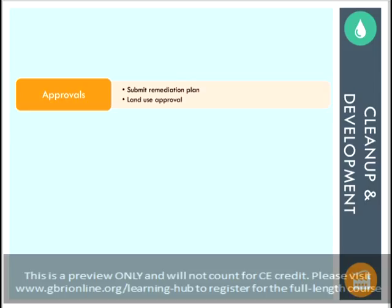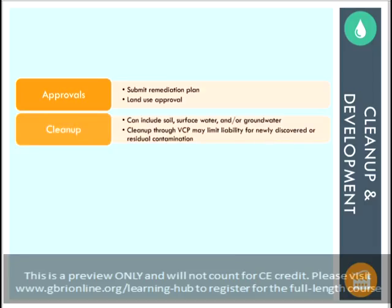Because many brownfields are in more developed areas, there may be city or local codes that need to be acknowledged, or there may be historical preservation protections in place that will need to be considered. Once all approvals have been secured, the site cleanup can begin. This can include cleaning of the soil, surface water, and ground water, and can also entail removing hazardous materials from the site. In cases where the developer performing the cleanup is not the same entity who originally created the pollution, a state voluntary cleanup program may be involved. This can often limit the developer's liabilities with regards to any contamination discovered after the cleanup process has begun, or residual contamination that remains after an honest effort at cleanup. The cleanup should be verified when complete by the body that originally designated the site as a brownfield or another approved regulatory body.